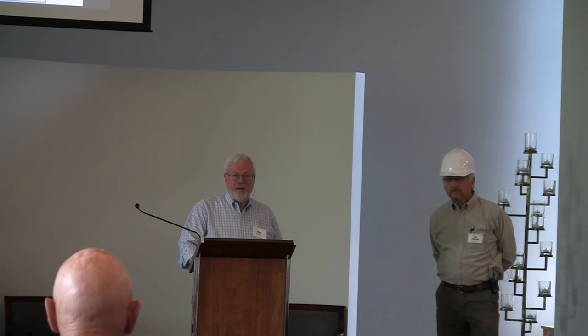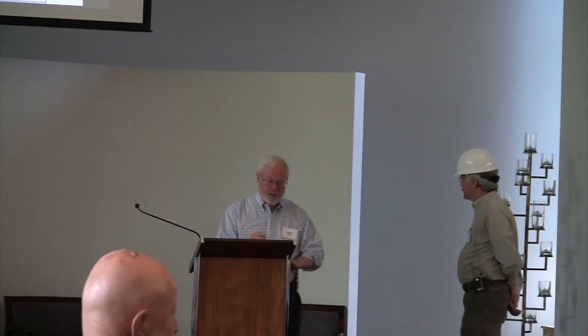The one I'm mostly concerned about is the asbestos abatement. You have a firm bid on that? Yep. And have you applied to the state for their approval? That'll be handled by the company that's doing the abatement. We don't apply for the permit, but that application can be quite lengthy. The company doing the abatement is going to handle the paperwork with the state, and has to take it to a state-approved landfill. Okay. But just be prepared, that could cause a delay. Yeah. Okay.